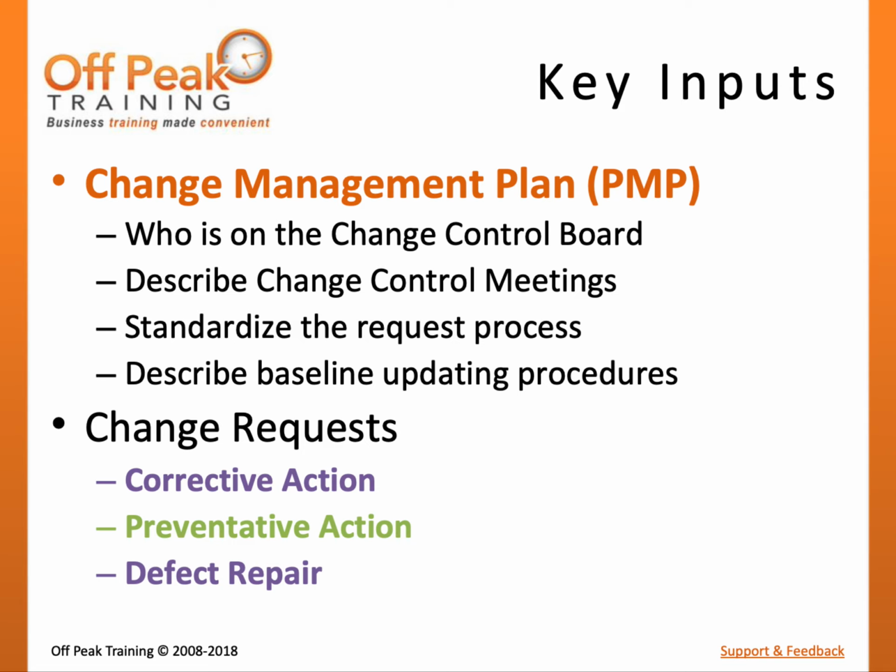In project execution, change requests can be made by the project resources as they are performing project work. The project management team may issue change requests while controlling the scope, schedule, and cost. Other project stakeholders, such as the sponsor, customer, or external stakeholders, can issue change requests during performance reporting and scope validation.